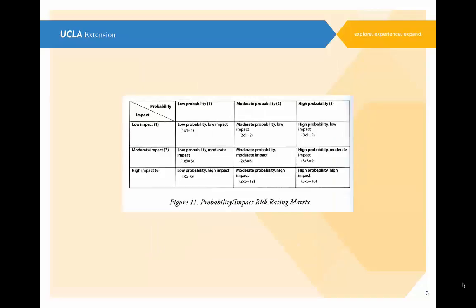Another way of looking at it is looking at a probability impact matrix. You look at your impact and you break it into three categories. This is almost identical to what you were just looking at. But now we go vertical and go from impact, we go from the top to the bottom, low impact, moderate, high impact. And then we look at the probability going across: low, moderate, high. And then we try to figure out in which one of these nine quadrants, well, they're not quadrants, but nine sectors, do we want to rate the risk? And that's another way of doing it. And what I'm showing you right now is I'm just giving you a brief look at how we're going to go into risk and deal with risk. And you'll get into these areas far and far more depth and far greater understanding and perspective as we go through this course.